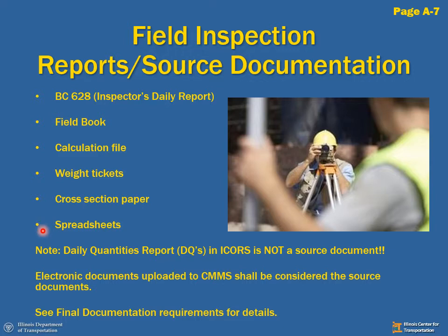Please note that if you're using I-Cores, the daily quantities reports are not source documents. They represent information collected from your source documents. Electronic documents uploaded to CMMS shall be considered the source documents, not the paper document anymore. You can see the final documentation requirements for more details.